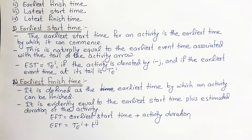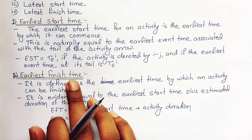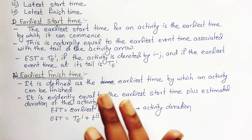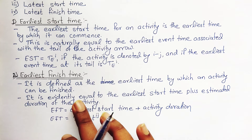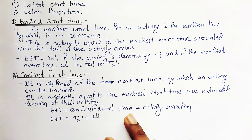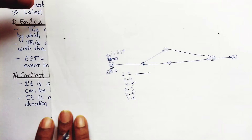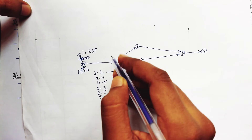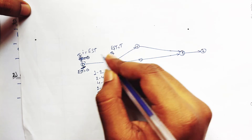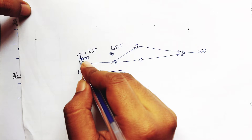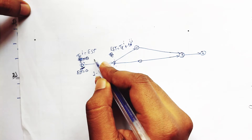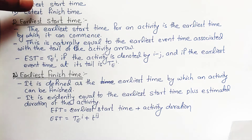The Earliest Finish Time is defined as the earliest time by which an activity can be finished. It is evidently equal to the Earliest Start Time plus the estimated duration of the activity. So: EFT = T_E(I) + t(IJ), where T_E(I) is the earliest event time of the tail event and t(IJ) is the duration of activity I→J.